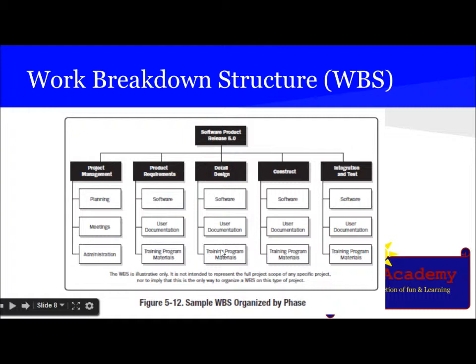And this is a sample WBS organized by phases. Software development release is divided into project management, product requirements, detailed design, construct, integration and test. Each of the phases, like project management, is subdivided into planning, meeting and administration.